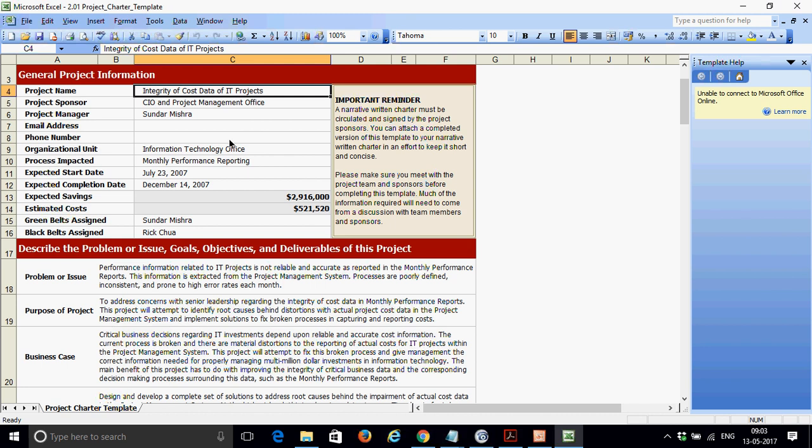So what is the process? And this is one template. It's not that every project charter should follow the same template. Every organization has its own documents, some template guidelines. But this is the rough information that should be in the project charter to consider it a project charter. Which organization it belongs to, what are the processes, when you started, expected start date and expected end date. When you have this information, you know that okay, this is a project, and some way it has to close.